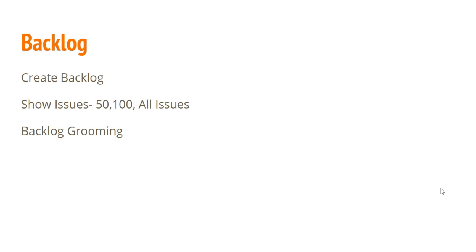Well, the another term that we have related to backlog is backlog grooming. Backlog grooming, or also known as backlog refinement, is when the product owner and some or all of the rest of the team review items on the backlog to ensure the backlog contains the appropriate items, so that the backlog items are prioritized and the items that are on the top of the backlog are ready for delivery. Well, any user of Jira can add items in backlog, but it totally depends on product owner what items are ready for refinement or ready for delivery in backlog.